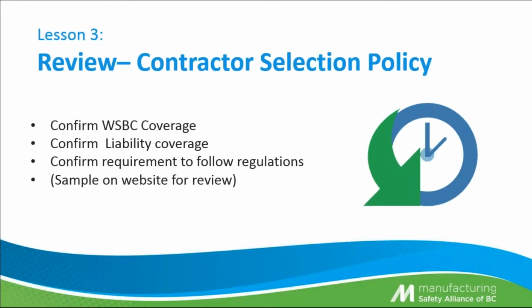So for the Lesson 3 review, your contractor selection policy needs to have on it that your contractors have WorkSafe BC coverage. It also documents their liability coverage, and it confirms the requirement to follow regulations. And one more time, there is a sample for you to view on the website.